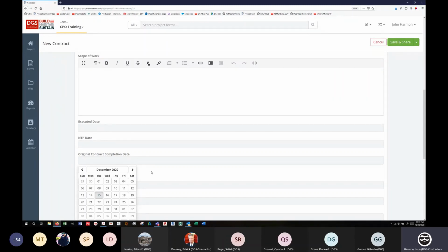You may need to read through your contract. I've seen a lot of contracts that have a substantial completion date listed, but don't call out the final completion date. Read your contract, see if it has a specific term for closeout period. If it does have a specific closeout period date or term, then you would add those days to the substantial completion date to determine your contract completion date. Okay, so you have to figure out what your contract says and utilize that to get the right contract completion date. This is the date that's going to update via change order.